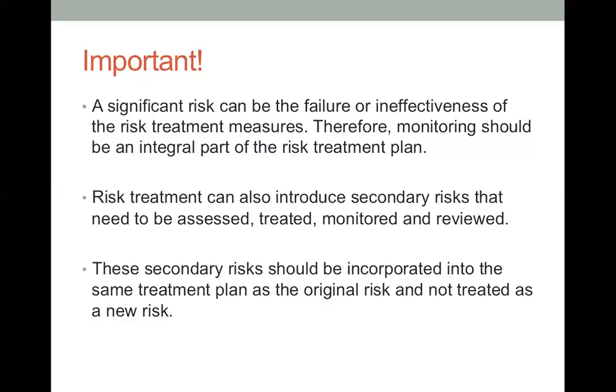If you refer to the risk management process framework, referring to the Australian/New Zealand Standard 31000/2009, in risk treatment we have the monitoring as well. We have the monitoring element in that process, and that monitoring is triggered because risk can develop into secondary risk.